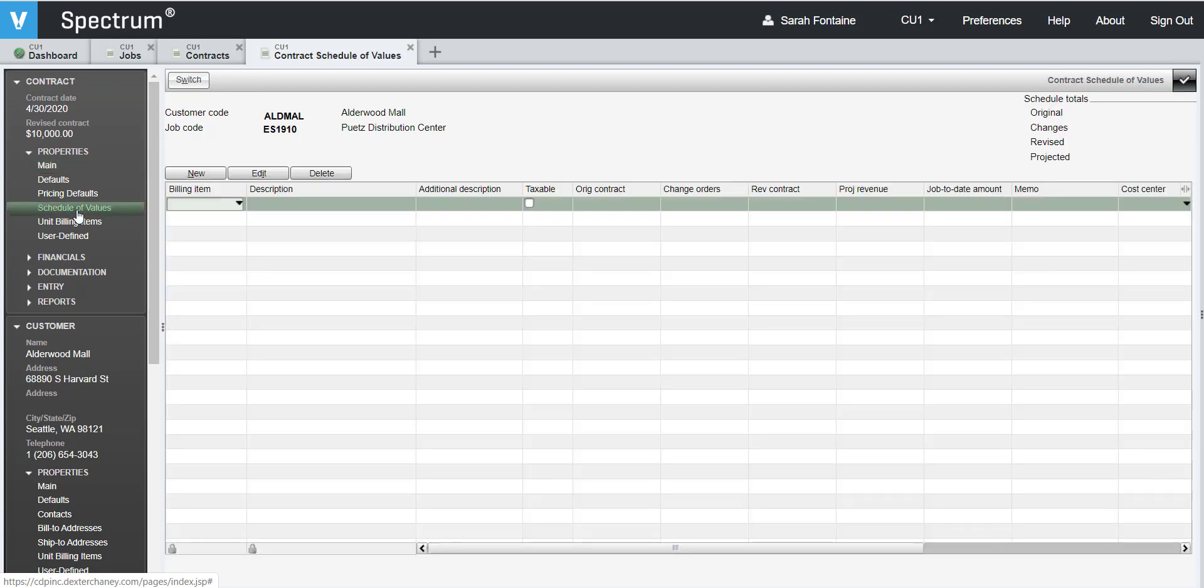Before we start entering our billing items, let's take a moment and discuss how we will structure these items. When you create a schedule of values, you can choose to create it with or without subtotal groupings, which will be displayed on the draw request documentation for your billing. For this tutorial, we will be creating a schedule of values without subtotal groupings.